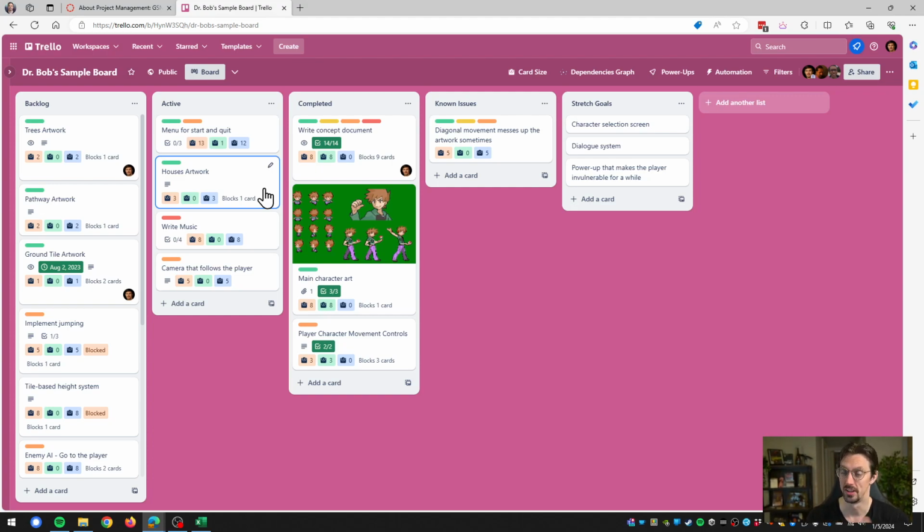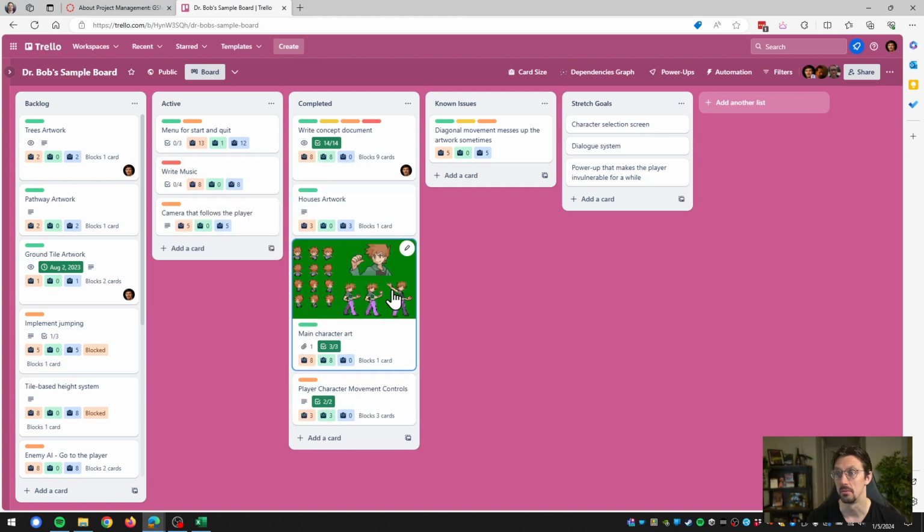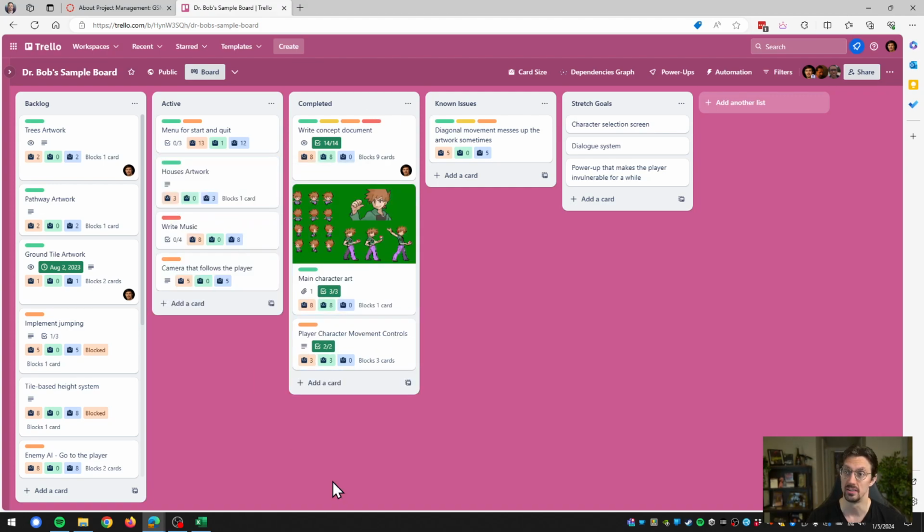Excuse me, uncut, right? So the general idea is that you create a backlog, you have an active category, is what it's called, I believe, and you have a completed category. And that's basically it. That's the simplest Kanban that you can come up with, these three columns. The backlog is the stuff that still needs to be done. The active thing is when somebody starts doing something, you just drag it over and put it in there. And the completed one is once you've completed something, you put it in there. And eventually this list, the first list, empties up and the latter list will fill up.